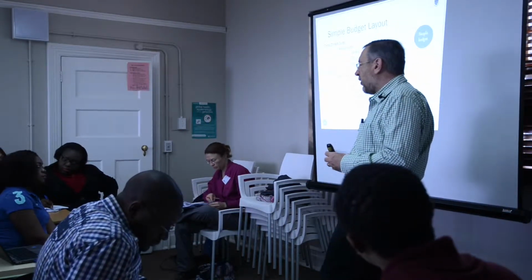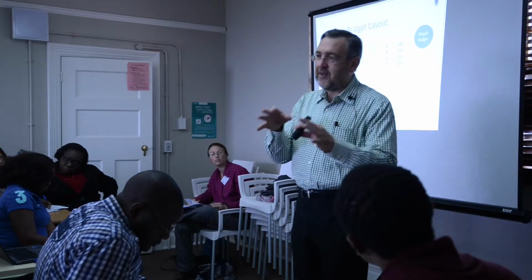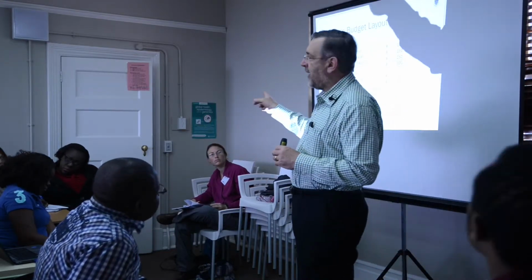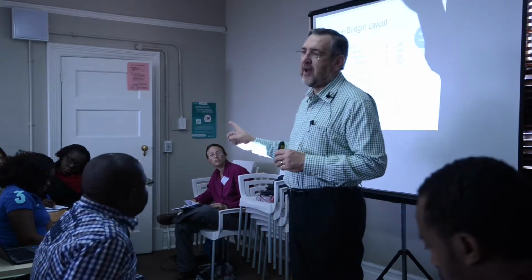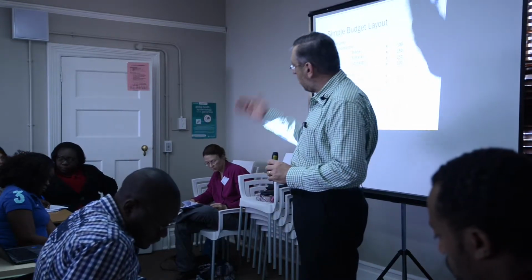So let's say our project today is sitting around these tables. So the tea that we'll have, the lunch that we'll have, and the paper and these folders, they are direct costs. Why? Because we will use them for our workshop.